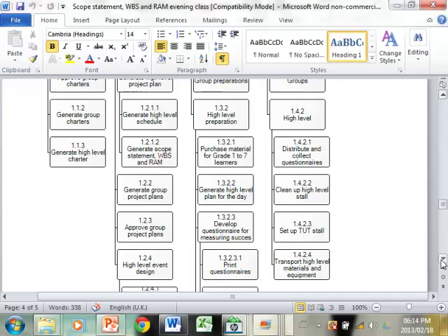Okay, and we will talk about it, and if there's anything that's missing, we will add it. Okay, because this is what I sat and I did in my office. And remember, project managers are not supposed to sit alone in their offices and do the planning. You're supposed to do the planning as part of a team. All right. And so it's okay if you do this as the project manager, just to have an initial structure, but you then have to be open to the team saying to you, but wait a minute, you've forgotten this and this must be added. And do you understand what I'm saying?